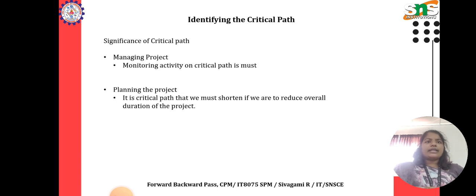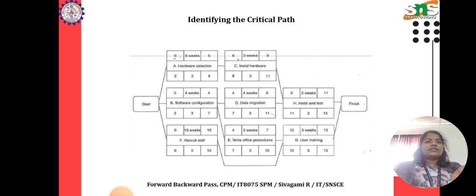Significance of the critical path. When managing a project, monitoring activities on the critical path is a must. When planning the project, it is the critical path that we must shorten if we are to reduce the overall duration of the project. Here I give the flowchart identifying the critical path.